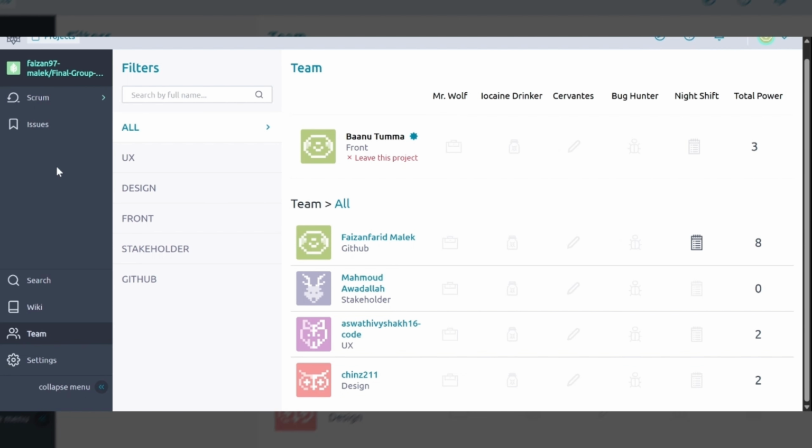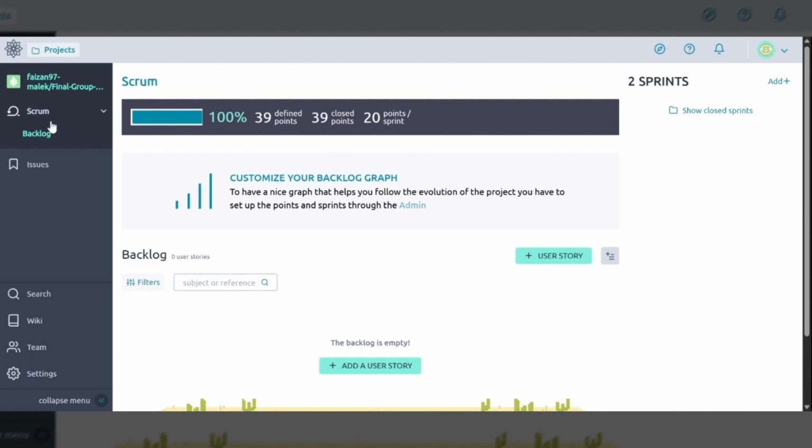Coming to the project, we created a product backlog in Taiga. This backlog included more than 12 user stories, each written in the agile format. Some examples include loading the dataset, cleaning the data, identifying peak usage hours, showing popular stations, and preparing data for the dashboard. Each user story had acceptance criteria, priorities, story points, and dependencies.